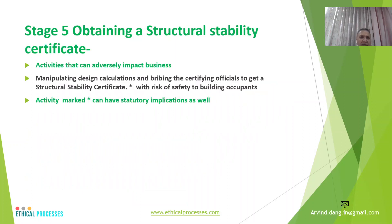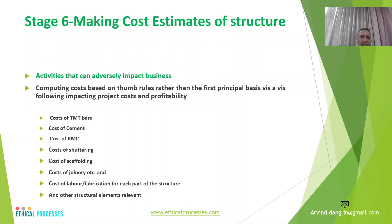Stage 5 is obtaining the structure stability certificate. Authorized agencies — for example, IITs — provide vetting and issue these certificates. One must ensure that these are obtained fairly by providing supporting calculations for design stability.